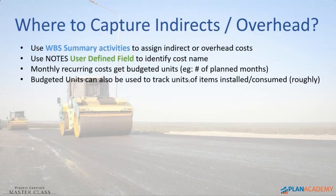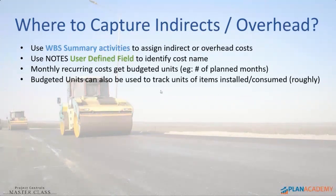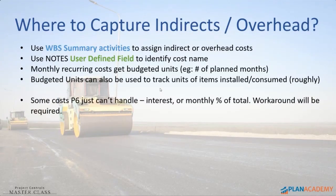Budgeted units can also be used to track the number of items installed or consumed. I say roughly here, because I just want high levels. I don't want to track one of 12,000 units installed or something like that.